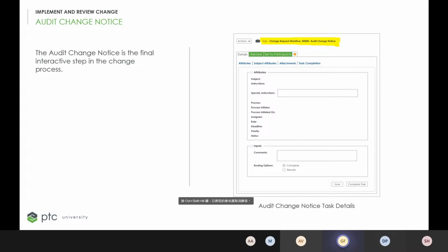And he has to basically examine all the objects, the bill of material changes, and verify that each part has been done properly. And the CA3 will then record his decision whether to approve these task changes or send them back for correction to the individuals responsible for the implementation.